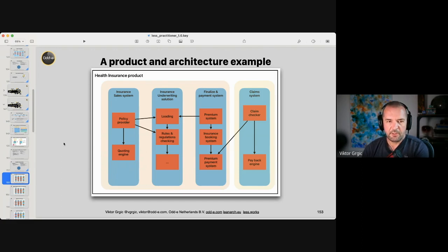One of the first steps in a feature team adoption map that I do is to ask the group to draw this architectural diagram. It doesn't need to be comprehensive, but it has to have a certain quality to it, meaning that the components on the lowest level are clearly managed by a specific group of people or specific individuals. That's pretty clear. So there's a correlation between a group of people working on something and a lowest-level component. So you don't need to go to a lower level than that. And it will become obvious later why this matters.